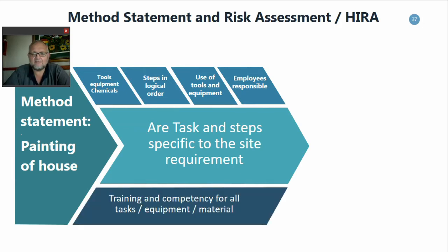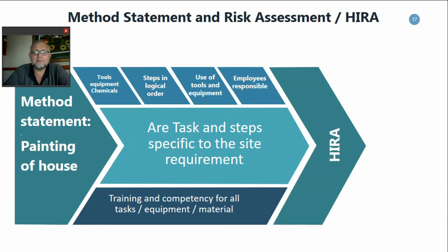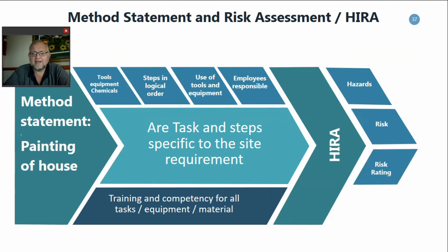And everything must be underpinned by training and competency on how to do the task and work with the equipment and material. Once you've got everything like that in place, only then can you proceed to do the risk assessment. Within the risk assessment, you're going to look at the hazards that have been identified, the risk attached to the hazards, the rating of how dangerous the risk is to your employee, and then obviously the controls and how to make sure you're going to do the tasks safely.